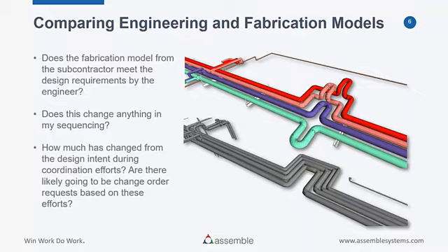Additionally, though, from my experience, a number of times you actually have maybe poorly coordinated design drawings, and as you go through that coordination effort, you have a number of changes. I'm sure you guys are aware that have done this coordination process as well, that you likely can expect change order requests to come in based off of these changes that occur.